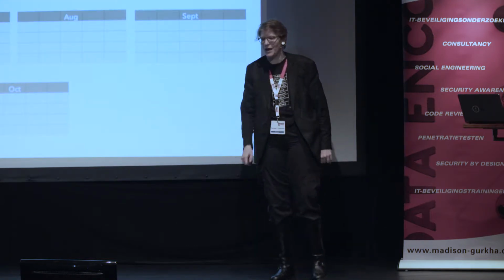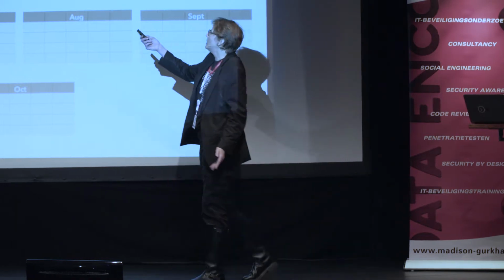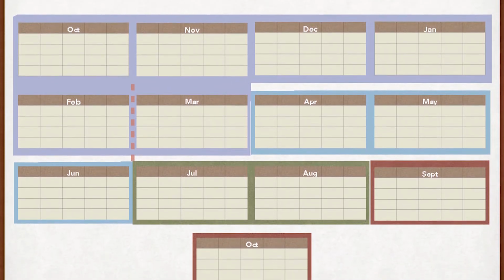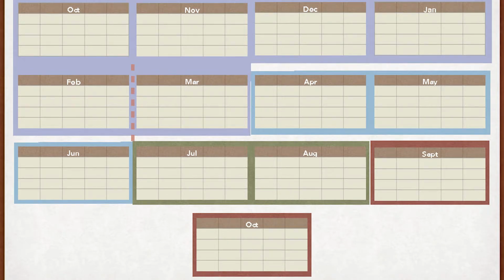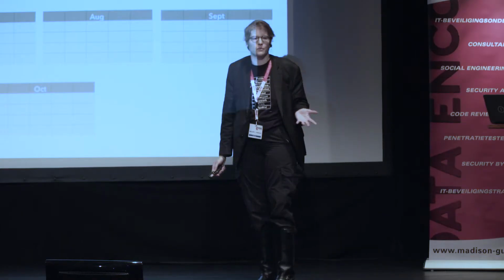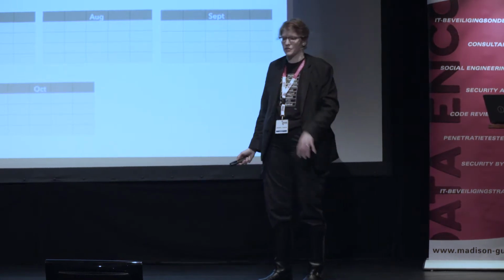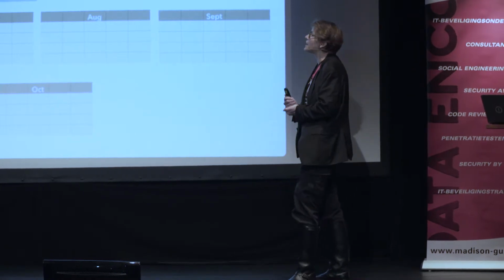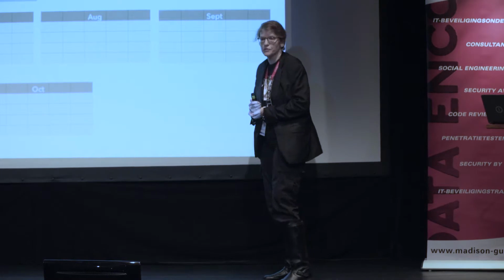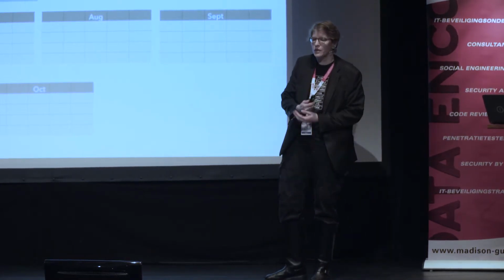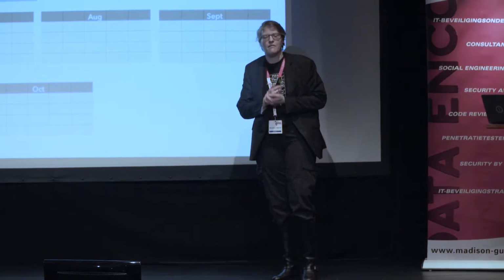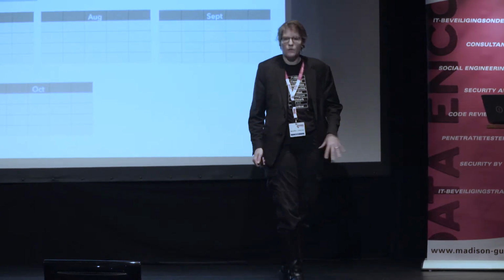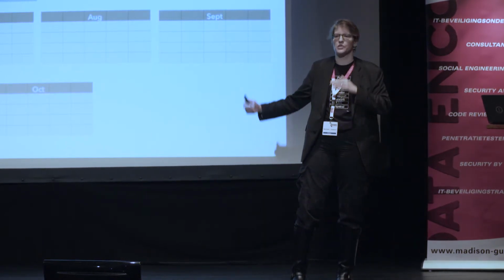So what is the time we have available? We really got rolling, code-wise, in October. We started hacking a prototype together. And that dotted line at the end of February is when we showed the prototype to the investors and got that second tranche of funding. So we're treating that entire prototyping time plus the first month after the milestone as planning time, because that is the time we took to figure out what everything was supposed to be, what everything was supposed to do, and how it was supposed to talk to each other.